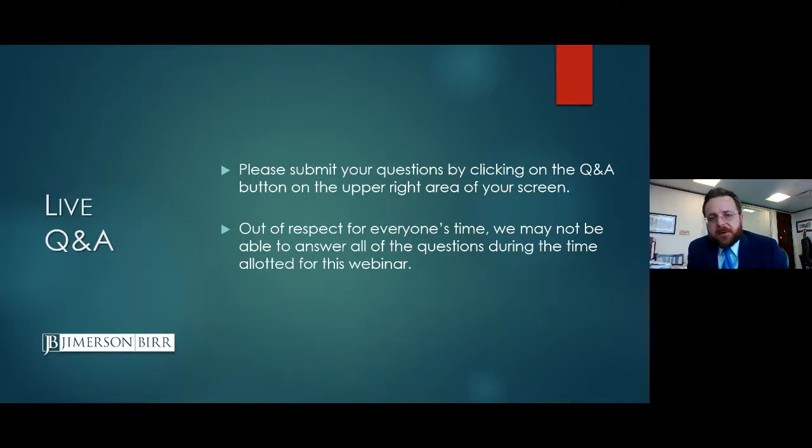Another thing to consider is, even though the GC may at first say he's not going to accept any changes, try pushing back. Terms of the contract are just as important as your price and scope. And we've seen subs have success pushing back against GCs that at first said, it's my form or the highway. If you do, pick the 3 or 4 key terms that are the most important for you and see if you can get those more favorable to you.